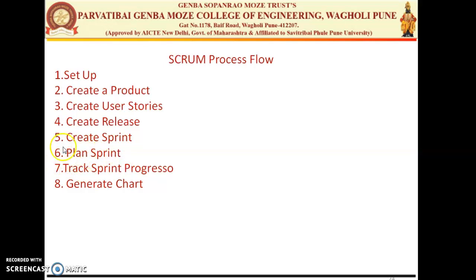Everything is done by the Scrum Master by balancing and by creating a velocity chart. That is the important tool under planning the sprint. You have to make sure how many people are available in the team, what they will handle, what different portfolios they have, what the priority list is for that particular sprint, what features need to be developed under that sprint, and what the starting and ending dates are. These things should be done in the sixth step, which is plan the sprint.